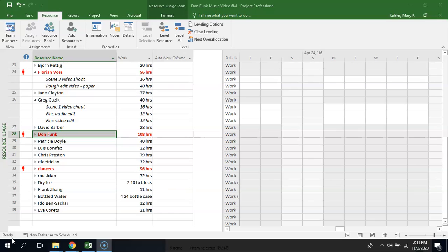So we have to figure out how to do that. You're going to use the same procedure that we used for the example in class. Make sure that you do those 3 time hacks, just like we did with the electricians: going from NA to the day before the period starts when it's not available, then a time hack where it's the time that it's not available, and then go back from the day after that to infinity, NA, for its regular availability again. Is that all ringing a bell?